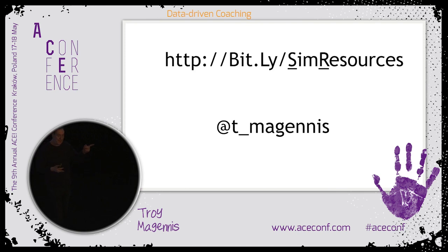Last week, I challenged the team to come up with a dashboard for the quality metric, and the one they came up with, of course, was just the defect count. And then immediately they put a control limit on it to actually say, we don't want more than 15 defects, or we don't want the trend to be above average by more than one standard deviation. And I said, what do you think will happen if we show that? Well, the defects will go down. And I said, well, no, I think the defects will stay exactly the same. I think people will stop reporting them. So putting a control limit and just counting the number of defects is pretty much the mortal sin.